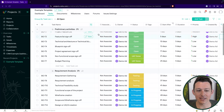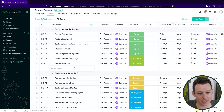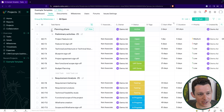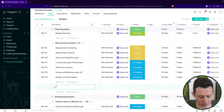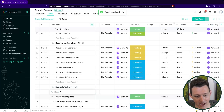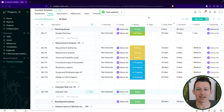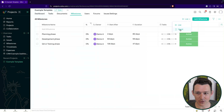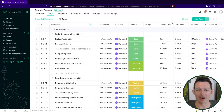A couple more quick things: when you need to add task lists, I like to go into group by milestone so I can see each of my milestones and task lists within them. From there, if I need to add additional task lists, I can do so within a particular milestone, and then add tasks within those. I normally recommend actually going to the milestones tab to add milestones, just so you can then go to your Gantt chart and see how things look on a timeline basis. That is the core of setting up the template.